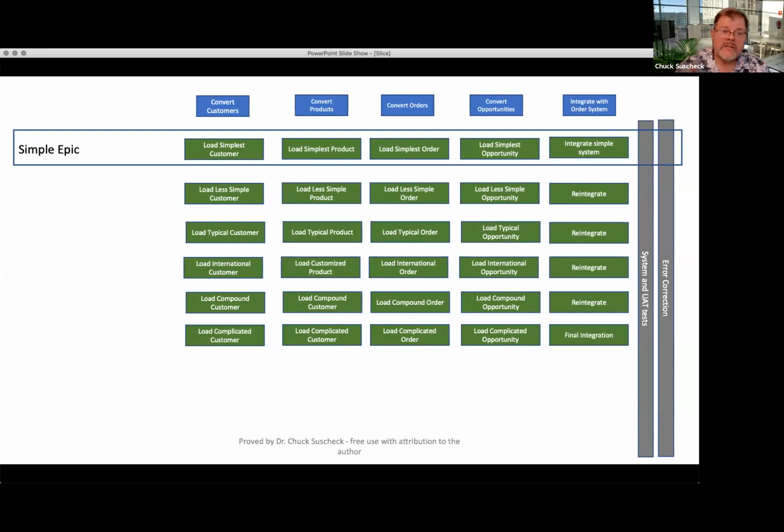Or maybe even like this, a finance group is doing a migration to a new product too. And we talked about how to split this up. And it's like, well, maybe our release should be just our whale customers, the ones that spend a lot of money with us. And then we can go back and add some of those complications later. Those folks, we can handle in the old system or handle manually in some different ways. So our minimal viable product, or marketable product maybe even, was not necessarily everything. It was the people who really mattered to us. And we let the other folks, I don't want to say slide, but they waited.